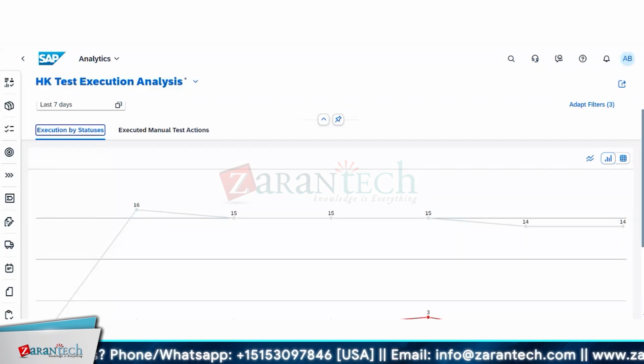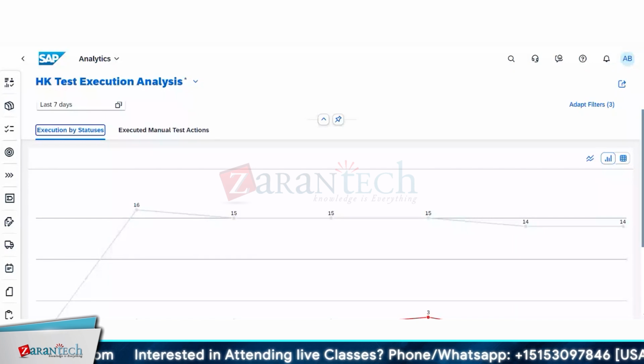So this test case is going to run as part of three different test plans, obviously, and individually also. Even if we don't take individual, even if it's going to run as a test plan only, you have three iterations, right? So it is like 40 times 3, 120 steps. You are not going to run it as part of one test plan and use the same result. You have to run it again as part of the second test plan, and once test plan one is done, two, and for the third, you'll have to run that test case again. So the same test case, but you're using it in different test plans. So it will contribute 120 steps to your total count, right?